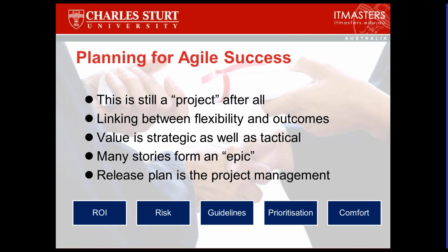Now, our plan takes these things into account. Return on investment. Sometimes, if we can package up a partial release, we can get paid for it. And that's usually a good thing. So progress payments, which are an important part of many projects, especially longer scale, long-term projects, are a way of measuring return on investment. If we can package something and get paid for it in its identifiable way, then that's usually a driving factor behind release planning.